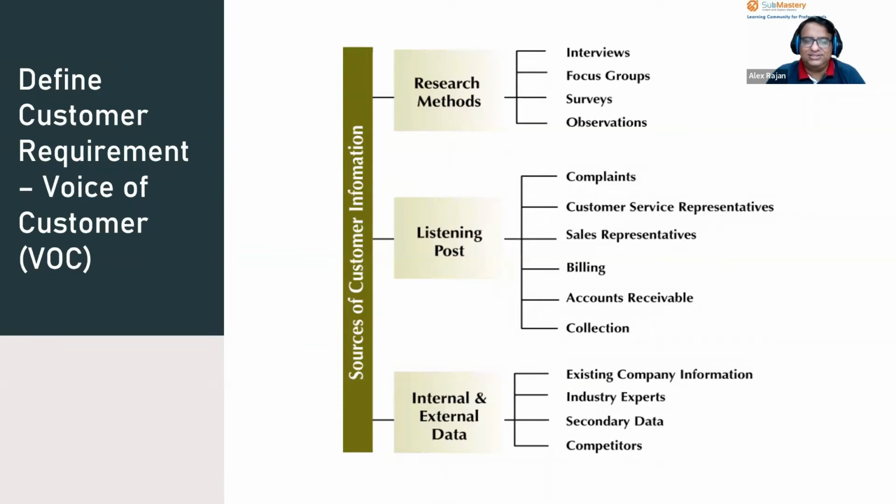Research methods are usually used when a project team wants to understand the requirement of the customer. They do an interview with the customers, a one-to-one interview, and try to understand their requirement. Or they do a group discussion with a group of people representing the customers, and we call that focus group discussions. It can be surveys that we do using a questionnaire, sending a survey through an email or through a telephonic survey. We send it to the customers and try to understand their requirement.